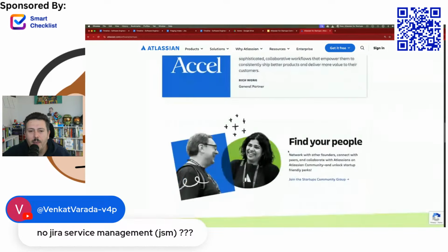And so if I move over to my Android team one, I'm going to have more data on that one. But when I'm looking at my epics, these are in the correct order so that I only start working on the stories that are associated to an epic that is the most important. That way, when my team is like, okay, what should we work on? What should we plan for the sprint? You're only planning work that is important based on the grand prioritization of everything we did in the plans, right?